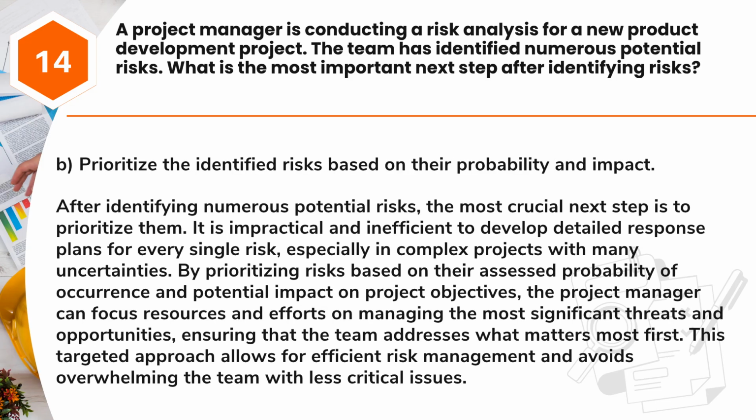Answer: B. Prioritize the identified risks based on their probability and impact. After identifying numerous potential risks, the most crucial next step is to prioritize them. It is impractical and inefficient to develop detailed response plans for every single risk, especially in complex projects with many uncertainties. By prioritizing risks based on their assessed probability of occurrence and potential impact on project objectives, the project manager